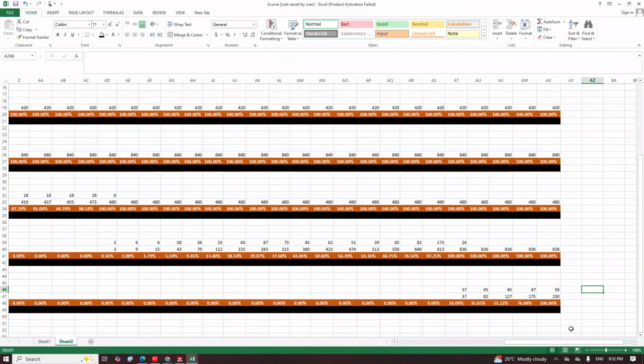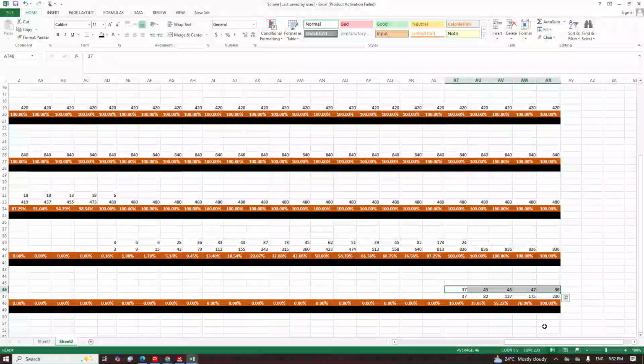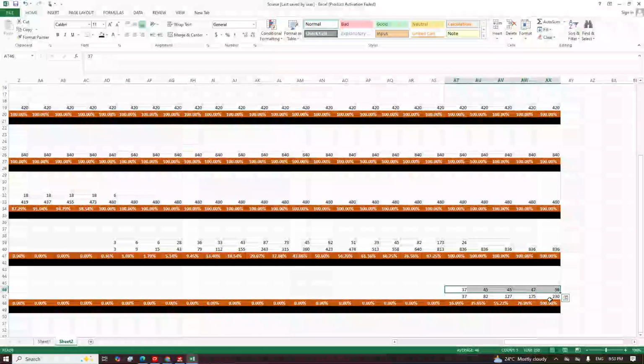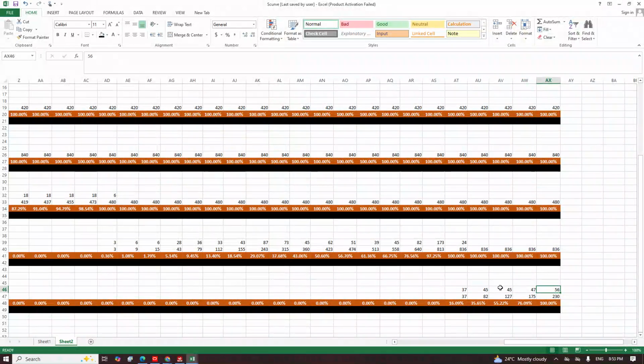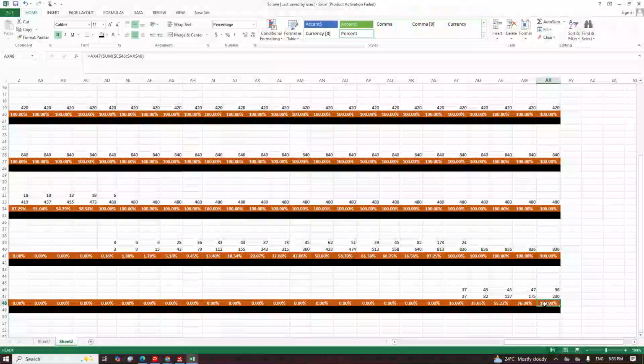What I'm doing is, Excel has a feature that tells you the summation of items when you select them. So I select everything here, and Excel will automatically give me the summation here. It says sum equals to 230. So before it was 55, it will be giving me 229. And when it gives me 229, I don't need to do calculation now. By looking at it, I will find out that this one is just 229. It's just 1. I will add 1 in any of these cells. You can add it in any of these cells, not that it must be the last one. Any of these cells, it will give you 100%. So that's just what we are doing.